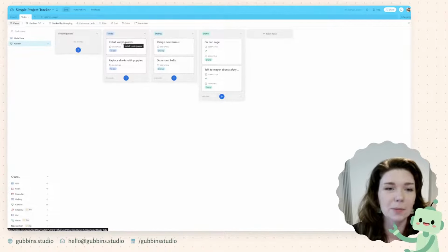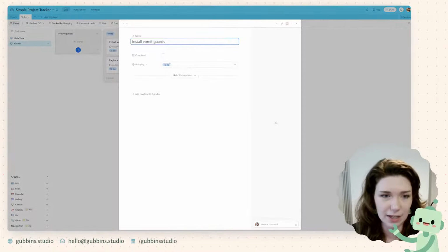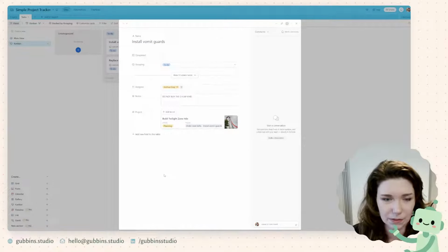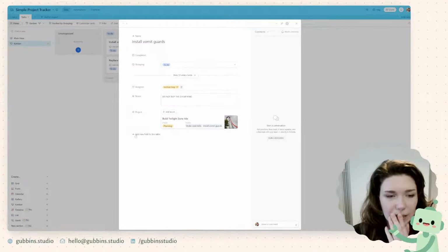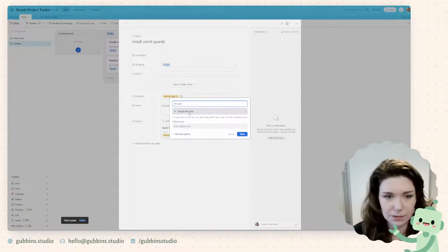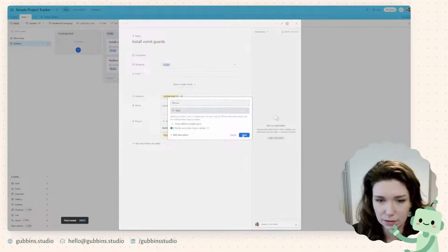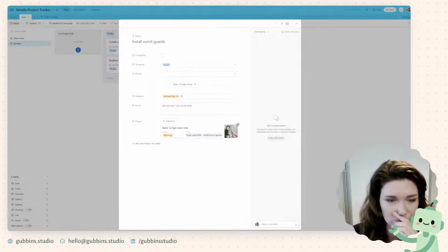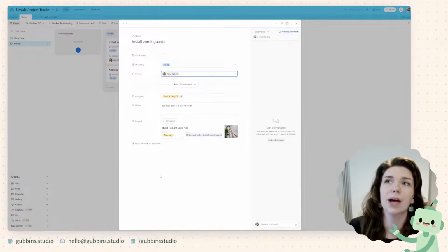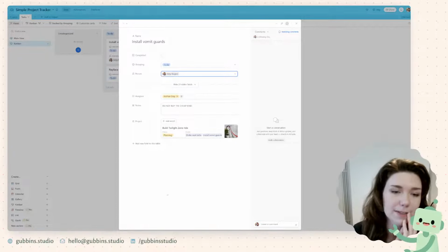So you can see here that we've got all our different tasks in the different columns of the Kanban board. For each task, you can assign it to, okay, that's not very helpful. If I wanted to assign it to a person in Airtable, you'd create a new field and make that user. Then assign it to me. Okay, so now I'm working on it. So if you had multiple people, that's how you would add them into the different cards.